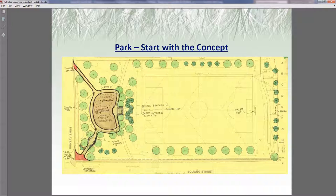I'll just sit there and count up some trees and multiply them by a rough number. Here there are about 42 deciduous trees times about $450 install per tree — that's $18,000–$19,000 right there. Using a ruler, there's about 150 meters of asphalt path at 2.4 meters wide — that's about $17,000. Park shelters: $40,000. We go on from there and start our cost estimate in Excel, just using a basic listing.